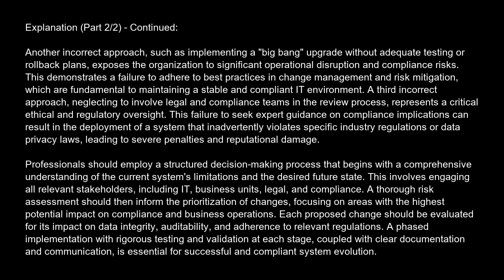Professionals should employ a structured decision-making process that begins with a comprehensive understanding of the current system's limitations and the desired future state. This involves engaging all relevant stakeholders, including IT, business units, legal, and compliance. A thorough risk assessment should then inform the prioritization of changes, focusing on areas with the highest potential impact on compliance and business operations. Each proposed change should be evaluated for its impact on data integrity, auditability, and adherence to relevant regulations. A phased implementation with rigorous testing and validation at each stage, coupled with clear documentation and communication, is essential for successful and compliant system evolution.